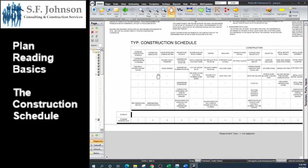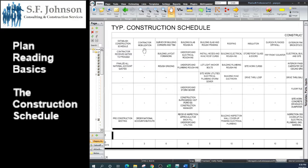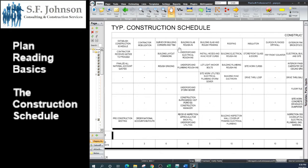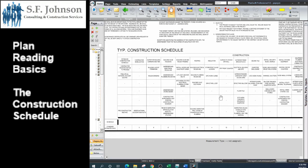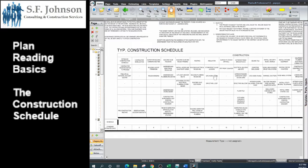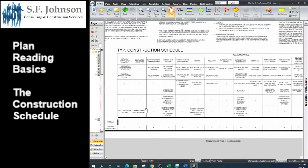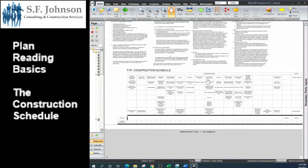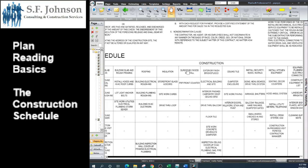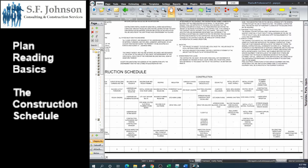If we progress on contractor mobilization, order national account buyouts, they assume that will take three days and on and on. They begin with basically mobilization paperwork type stuff, then they go to the surveying, rough grading. You can look at each of the columns and see the progression as the project moves forward. This is a good teaching tool to show the progression of any project: what comes first, what comes second, what are some of the things that we can do at the same time?